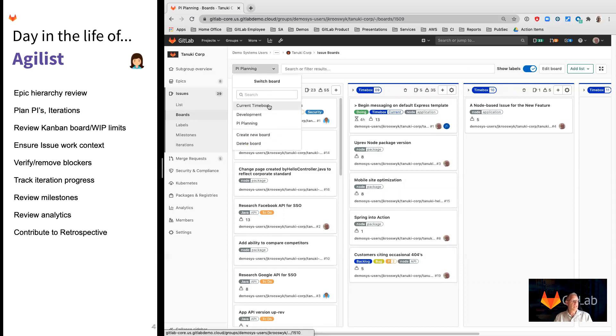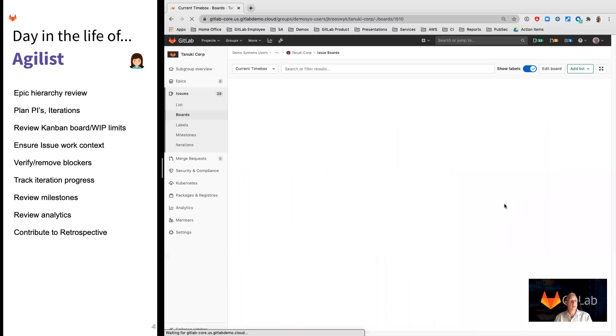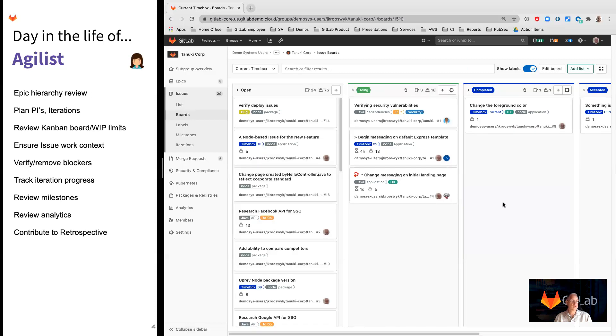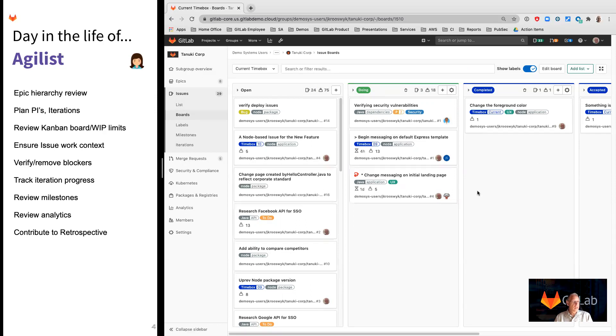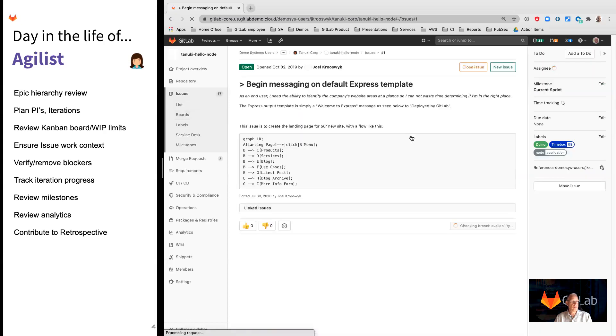Once I have done my backlog ranking and management, my prioritization of work, I can now go to the boards and that will be prioritized and viewable here on the boards. In this case, what I've done is put together a board for PI planning. So if you're doing program increments, you can actually create some labels and do a drag and drop from your prioritized backlog on the left into the time box structure on the right.